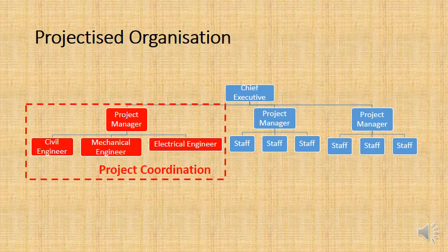And so that's why with these projectized organizations, you need a very big project to justify it, because in truth, you're never going to have one civil engineer. You're going to have several civil engineers and mechanical engineers and electrical engineers so that they can review one another's work.